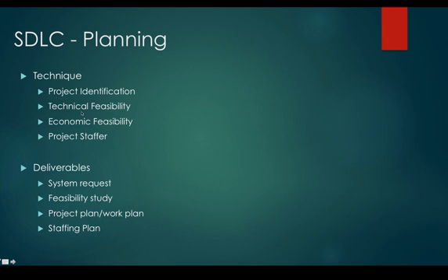Is it technically feasible? We need to do that initial research into this potential project to make sure it's even worth spending our time. The last thing we want to do is spend a whole bunch of time working on a project, scoping it out, doing research, assigning people to start doing the work, maybe even doing the work, just to find out that there is a piece of it that's technically not feasible. Then you end up having to scrap a whole bunch of effort, or considerably change the scope of the project when you're already into the actual implementation of it.